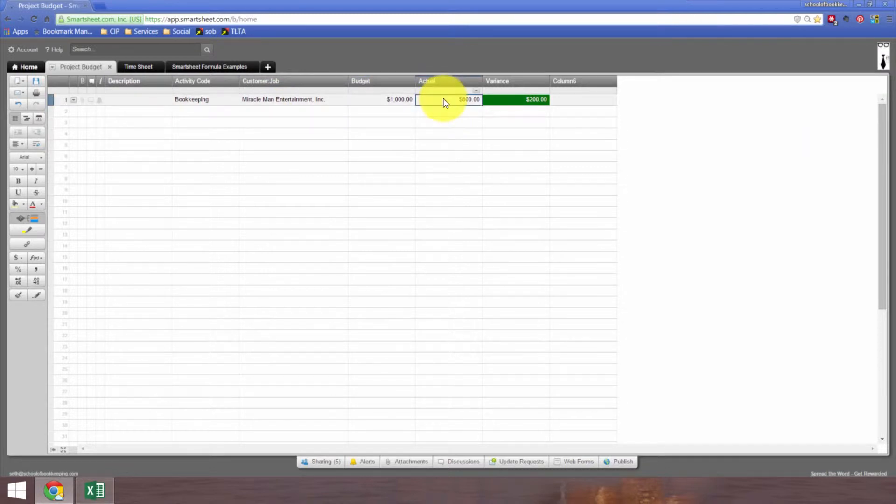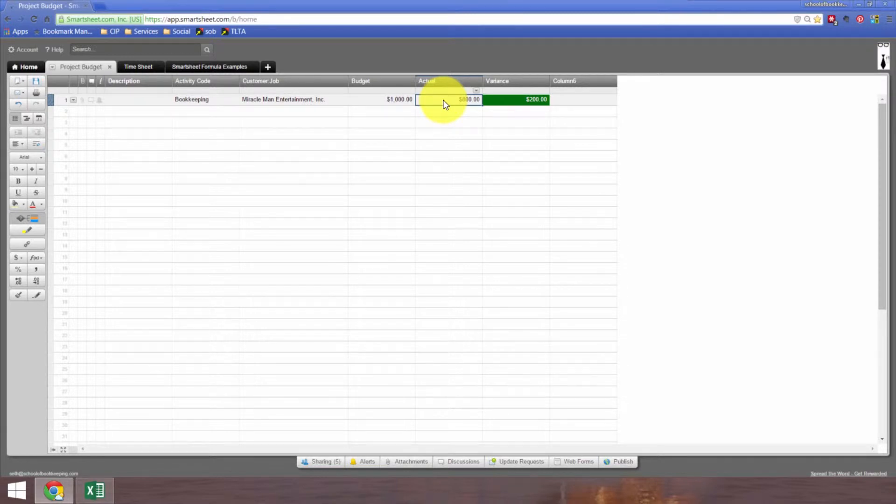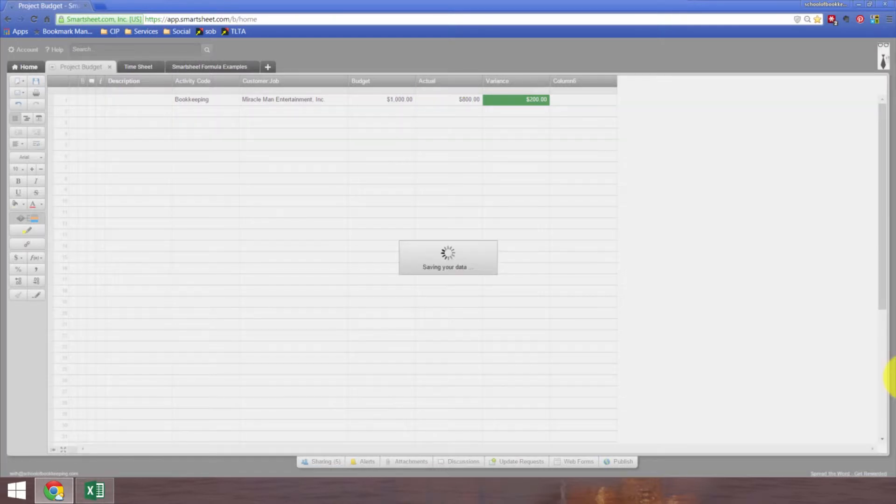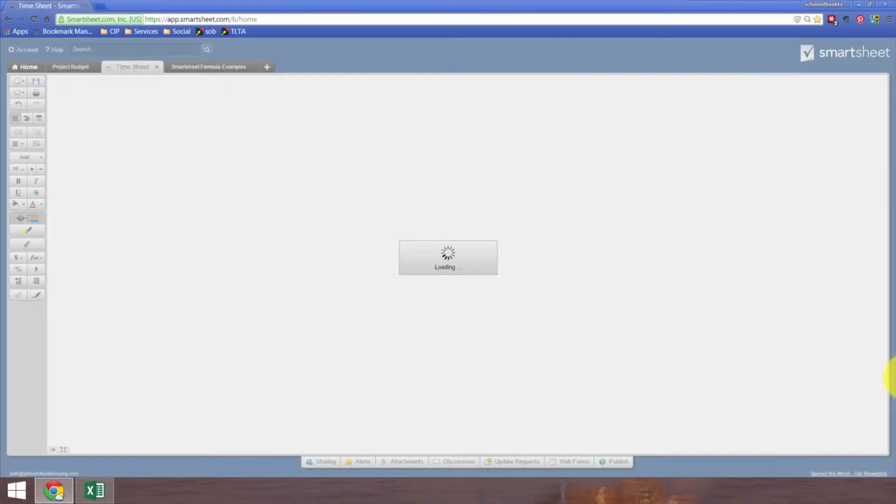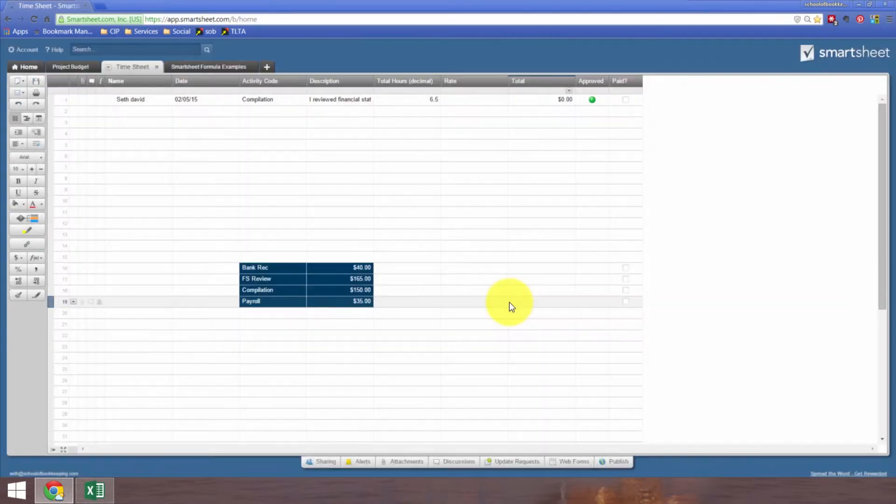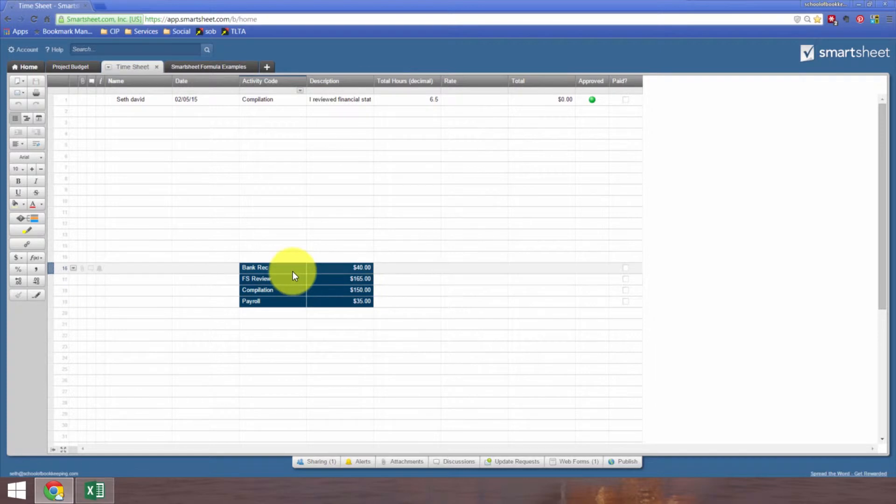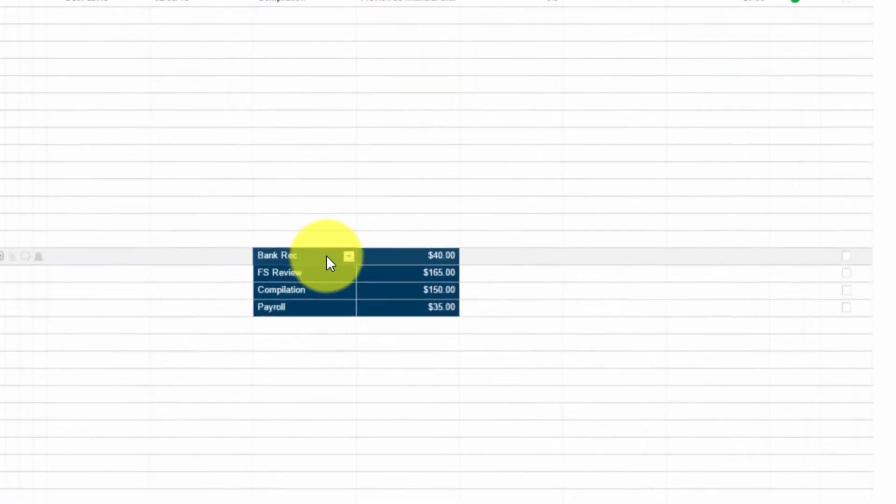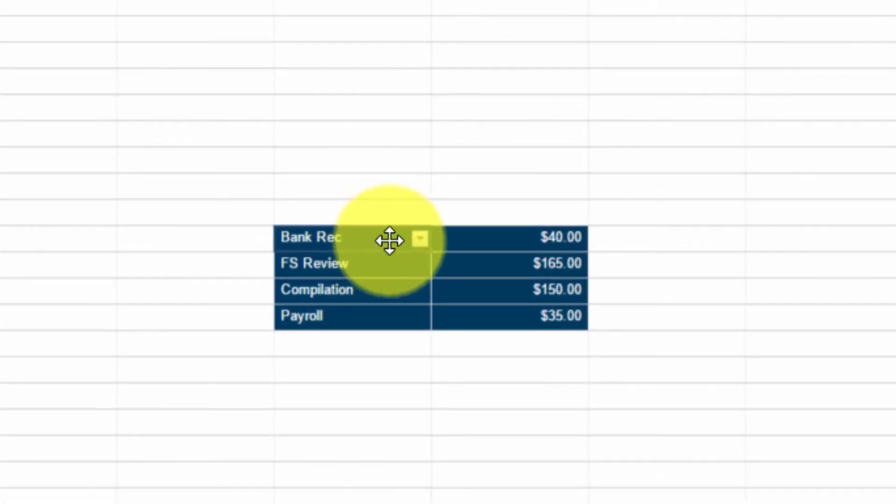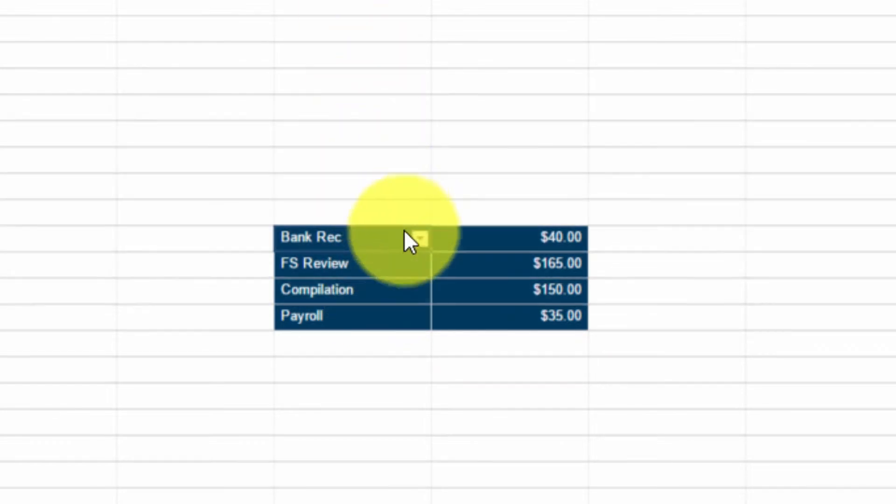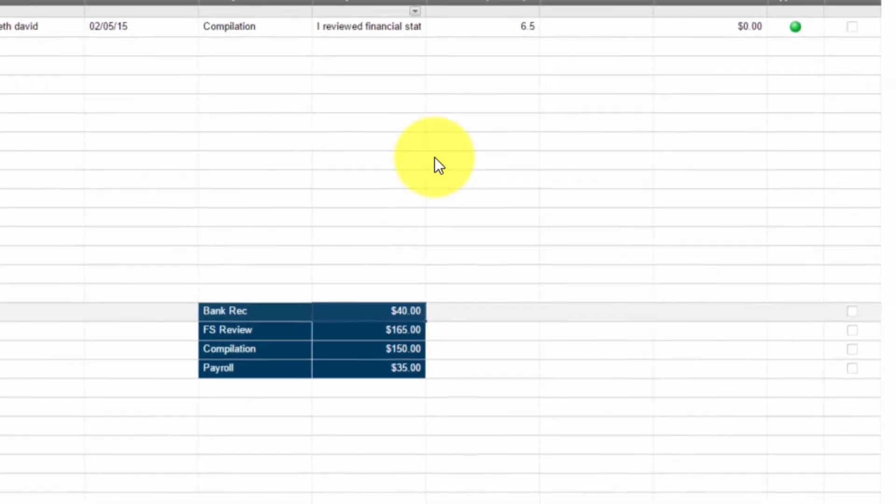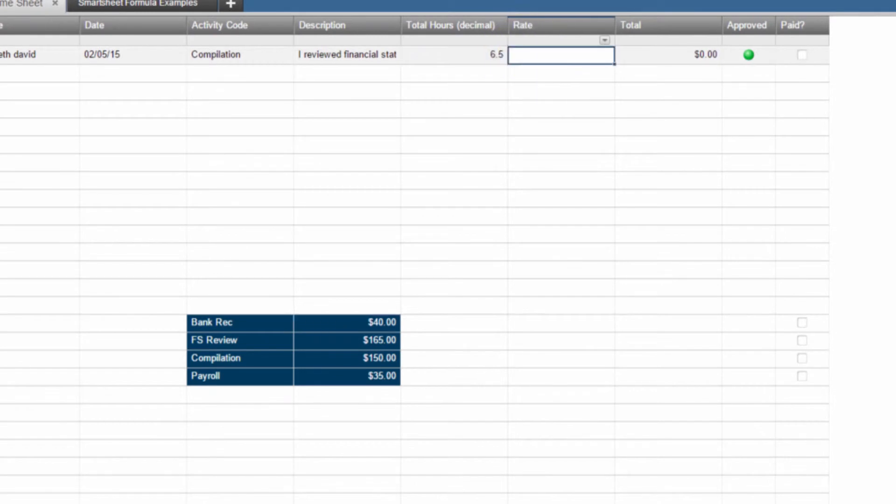You can make sure that you're not going over or under budget very easily. Of course, the question is, how are you going to tally up the actual? That's probably a subject for a whole other course. Now let's go over to the timesheet. I mentioned earlier that we could set something up where we can look up the rates. First I set up the rate table and purposely lined up the activity codes so I could choose them and establish the rate for each.